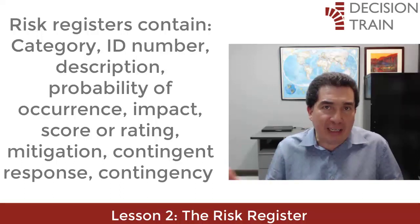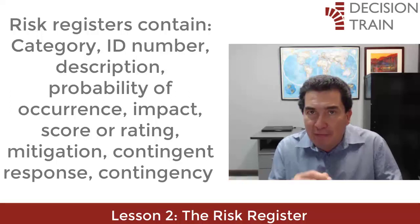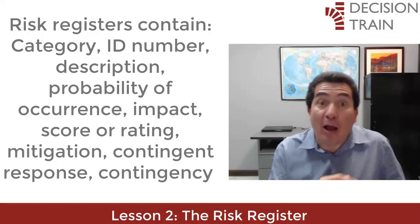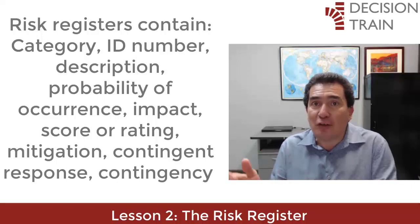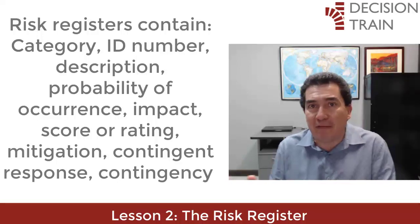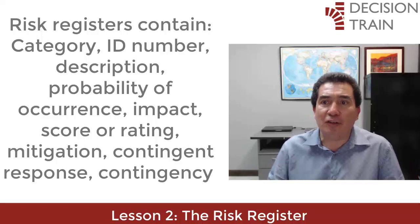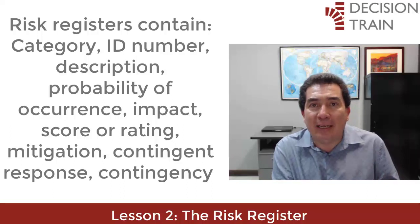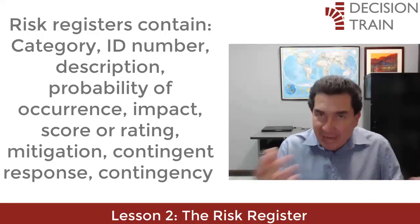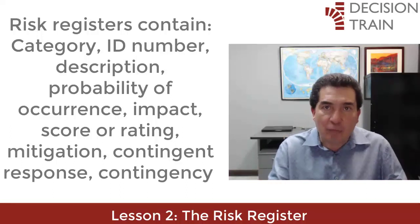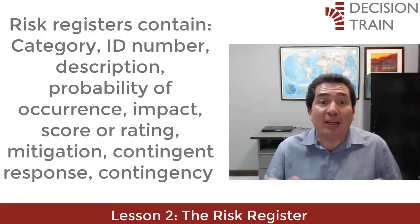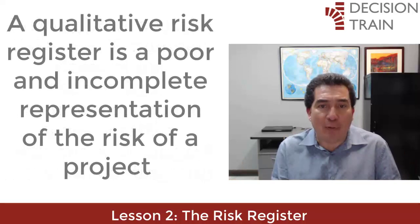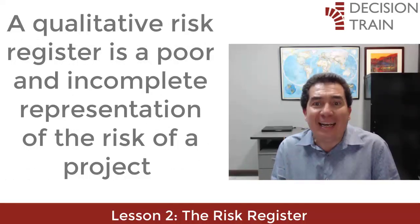A typical risk register also contains an identification number from the risk breakdown structure, a brief description or name of the risk to make it easy to discuss, the probability of occurrence, the impact — that is the consequence or severity if the event actually occurs — the score or risk rating, which is the multiplication of probability by impact, mitigation steps, contingent response, and contingency, which is the budget assigned to the contingent response.